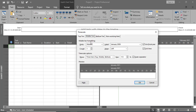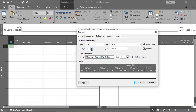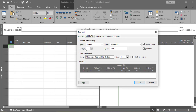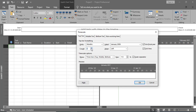After zooming you may need to adjust the time scale again — for example, setting it back to Month, Week, and Days. In the Time Scale settings there is also a Count option, which controls how many units are skipped in display. For example, with Count set to 3 for days, it shows day 20, then jumps to 23, then 26. With Count as 1, it shows every day: 15, 16, 17. You can set Count to 2 or 4 as well. You can set the Count for weeks and months similarly. Press OK when done.